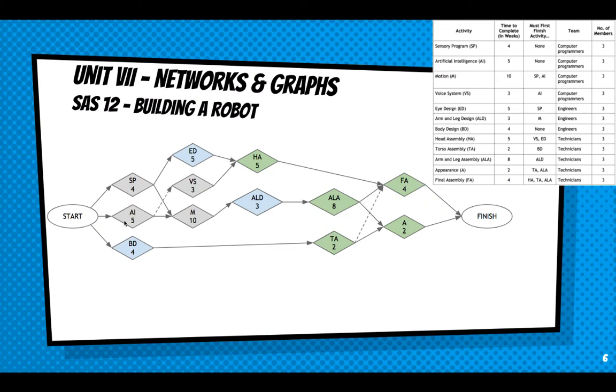But that's all the pathways that originate through sensory program. Let's go through artificial intelligence. So AI is 5. Go to vision, a voice system. That's 8. Another 5 for head assembly. That's 13 plus 4 is only 17. Obviously not a very long, that's not our minimum time of completion. Let's go another way. AI is 5. Motion is 10. That's 15. 3 is 18. 8 is 26. Is that right? 5, 15, 18, 26. Yes. 4 is 30.